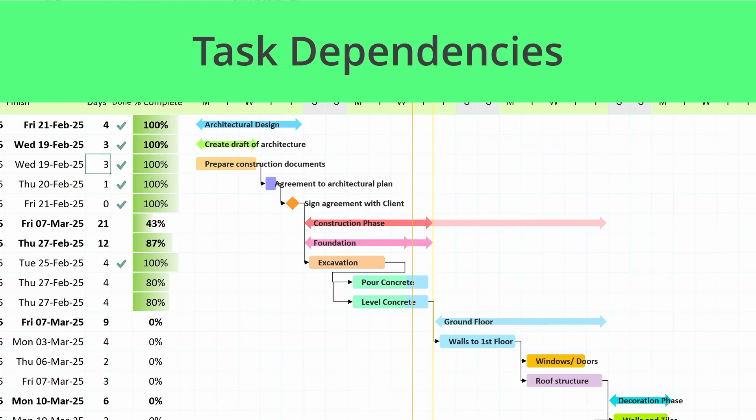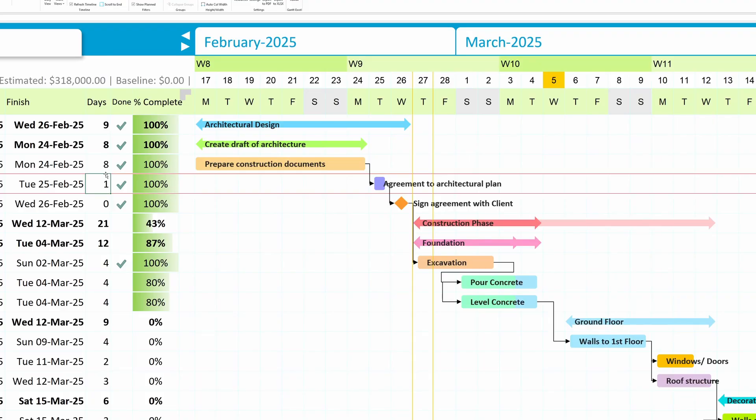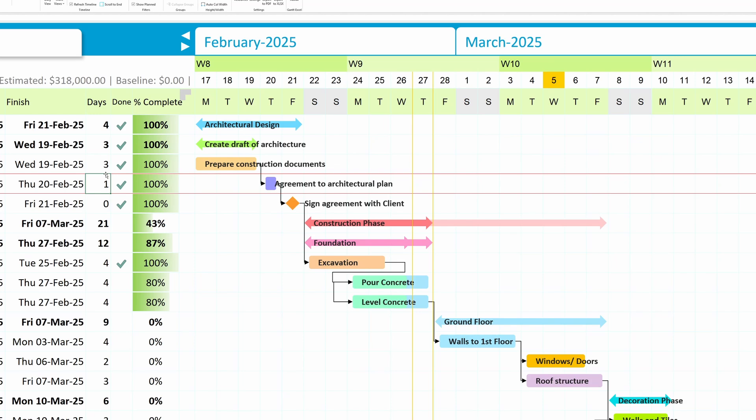Task dependencies. Need to see how one task affects another? Task dependencies allow you to link tasks together so changes in one will automatically adjust the rest, keeping your project timeline in sync.